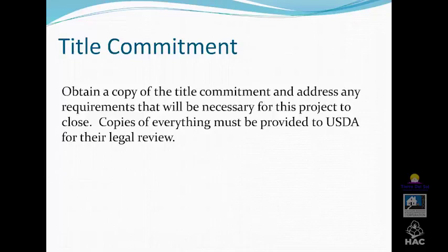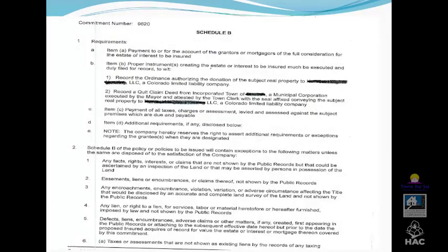So you will need to work closely with your local city or town to show that the project is in fact zoned properly, the plans have been approved, your utility design has been approved, and you will also need confirmation that building permits will be available as soon as your contractor is selected and you close on the loan.